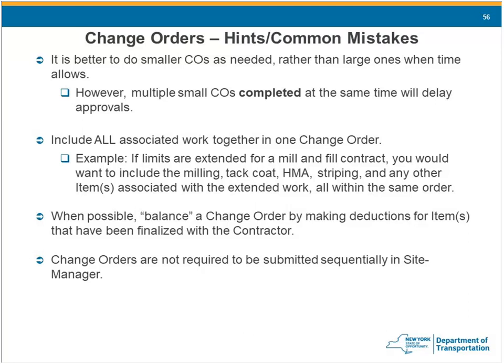Where possible, balance your change orders with decreases. This is especially important if you're doing something like changing a guide rail end section.